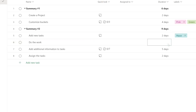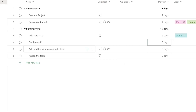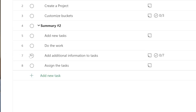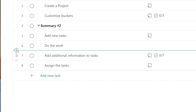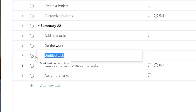I can also come in and say I want this to have a duration — I can say I want this to be three days. I can also insert something between tasks. I can go to the left side and there's a little dot, and I can click the plus and insert a task between. So 'Do More Work.'